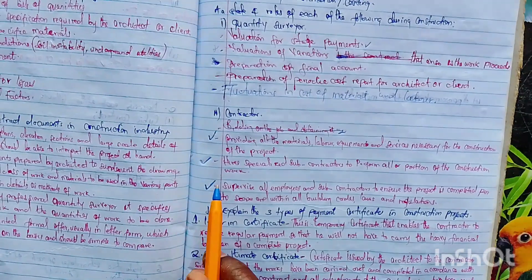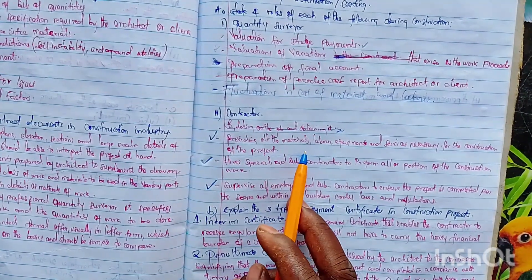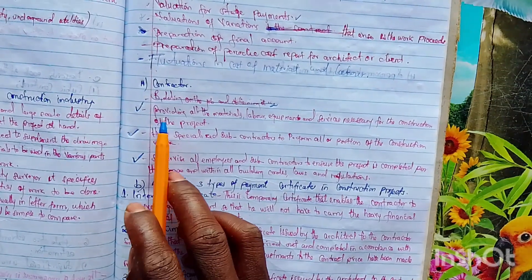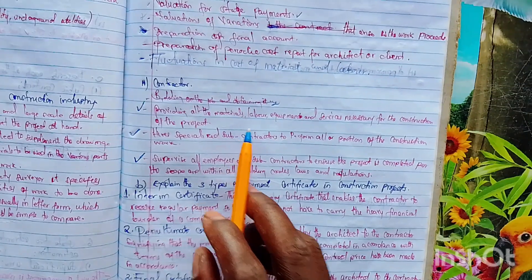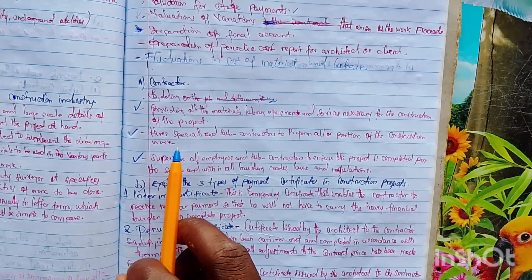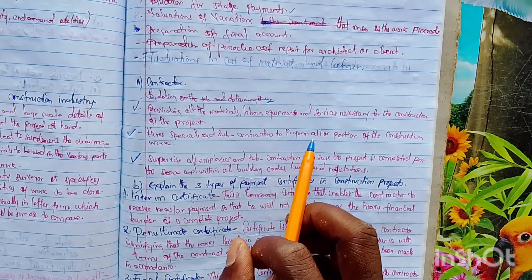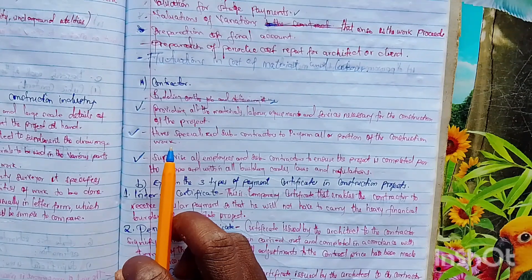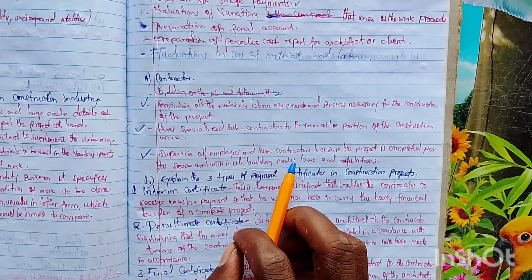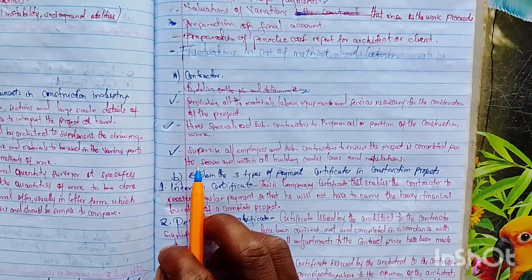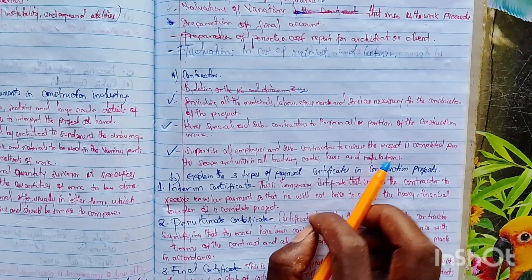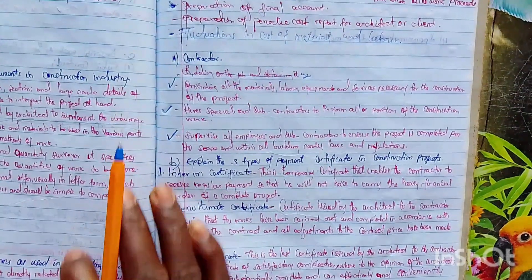The second part: roles of a contractor during construction. Number one — providing all material, labor, equipment and services necessary for the construction of the project. Number two — the contractor hires specialized subcontractors to perform all or a portion of the construction work. Number three — the contractor supervises all employees and subcontractors, ensuring the project is completed per the scope and within all building code laws and regulations.